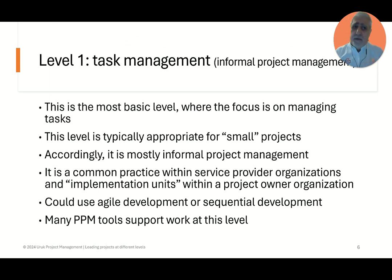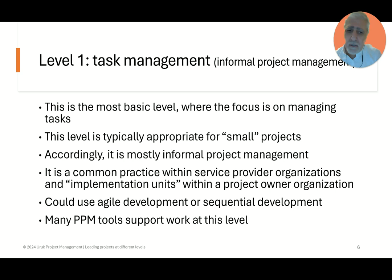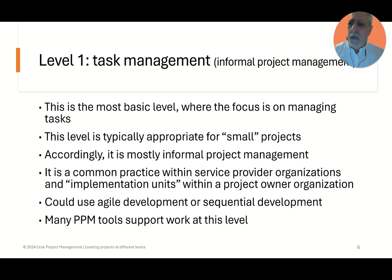With that in mind, let's go into each one of these levels. Level one — as we mentioned, task management, or what we might call informal project management. This is the most basic level where the focus is on managing tasks. This level is typically appropriate for small projects. It's mostly informal, common practice within service provider organizations and implementation units within a project owner organization. It could use agile development or sequential development. Many PPM tools support work at this level — when we hear people talking about Trello, for example, these are task management tools good for identifying, managing, and tracking tasks to completion.